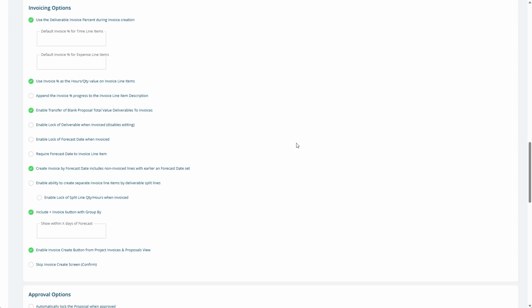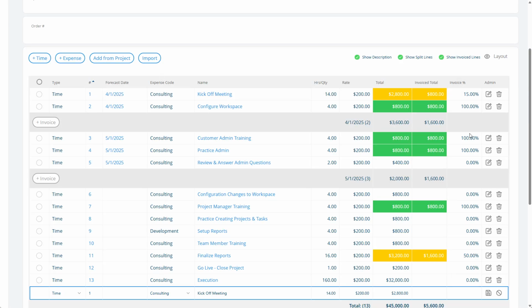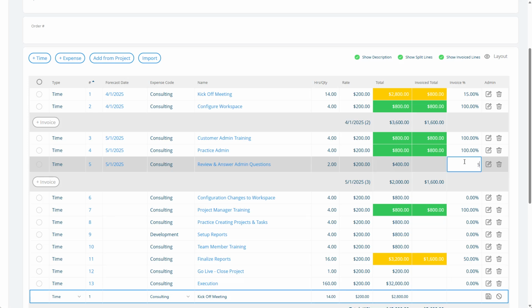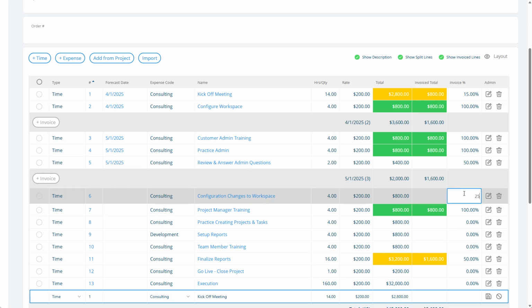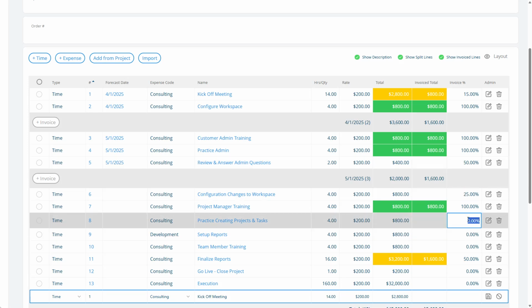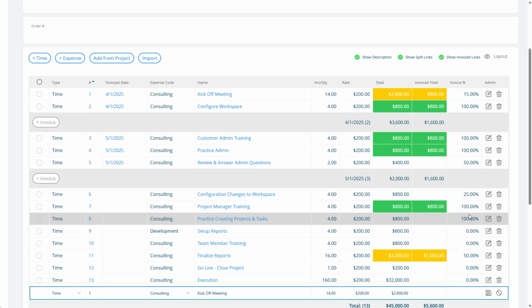In this video, I will review the invoicing options on the proposal configuration page. The first option here, use deliverables invoice percent during invoice creation. What this means is there's an invoice percent column, and when you're preparing to invoice, you'll come in here, click on it, say, I want to invoice 50% of this line, and I want to invoice 25% of this line, and then I want to invoice 100% of this line.